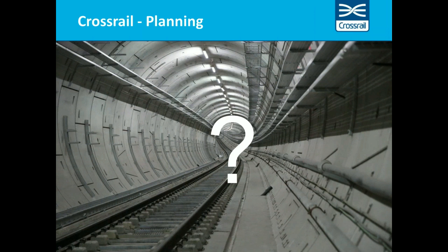What methods do you employ to ensure contractors keep on target within the schedule? Okay, so that's been a constant dialogue that we've been having around Crossrail, because clearly we are not going to agree with our contractors all the time on what the schedule looks like, which is why I made the important point that we don't roll up what our contractors are saying necessarily into our management plans and into our master operational handover schedules. From the perspective of what we call our tier 1 contractors, their view of the world may be very different from what Crossrail is planning, and we may have management actions which we know that we're going to take, which may realign their schedule back towards where Crossrail's strategy needs it to be.